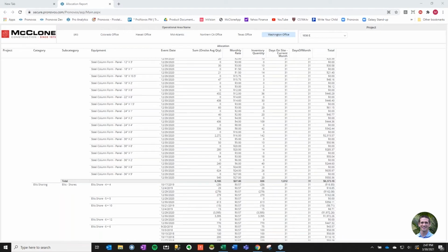We had our yard manager complain about last minute trucks. Hey, people are asking for trucks last minute. So we had all the information in the system, so we just created a quick report that allowed you to take your delivery times, when it was requested, because there's the timestamp that you can access on when the request was created, and then when it hit the job site. And we started to measure that time. And then we created a company standard around it.